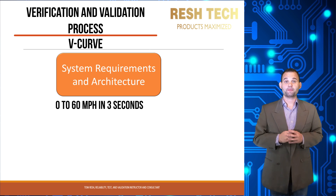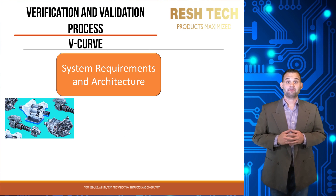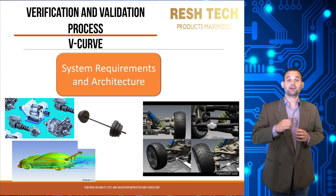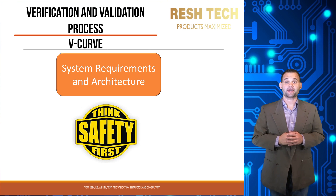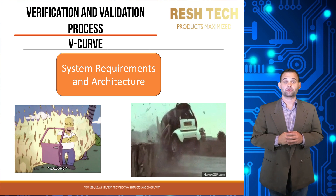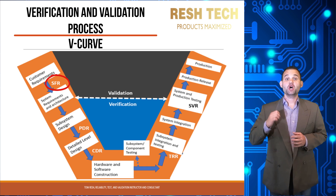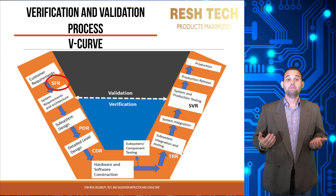Achieving 0-60 in 3 seconds requires integrated technical solutions that need multidisciplinary input, collaboration, and agreement. Everything from the horsepower and torque for the propulsion system to the weight, aerodynamics, chassis, tire, and wheel selection must be considered. Safety considerations such as crash design become more complex as you lighten the vehicle. Once system requirements and architecture are defined, a System Functional Review (SFR) is performed to ensure cross-functional agreement that the system requirements meet the customer's requirements.